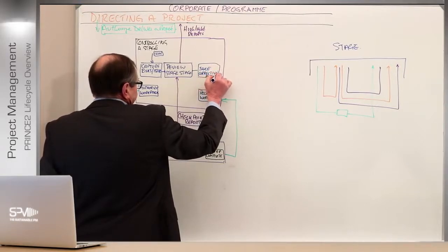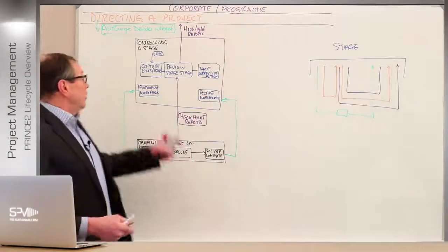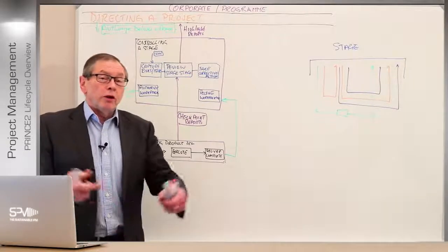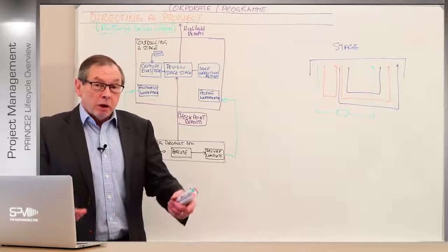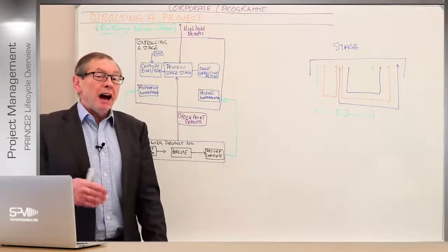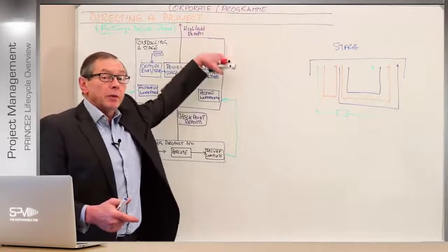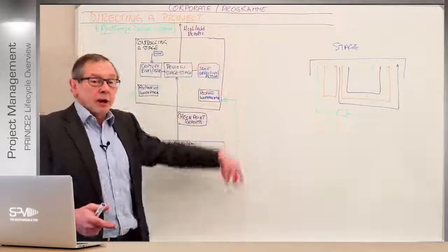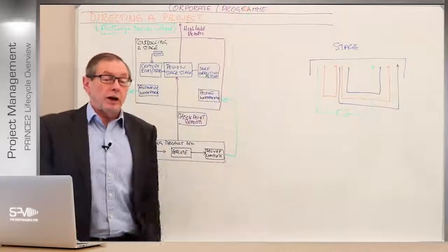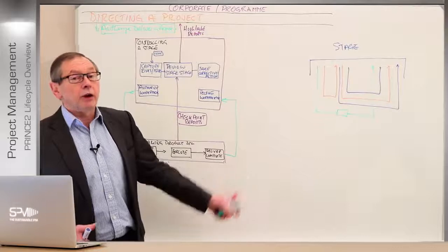Now, what does that mean at this point? Well, the first thing is, of course, the corrective action depends on what the situation is. And this is when we get down to the progress and looking at managing by exception, tolerances mainly. It's about empowerment to the project manager, and it ripples down from corporate or program into directing, into the PM, and into the team leader. So it goes through these three main levels of management within the team.